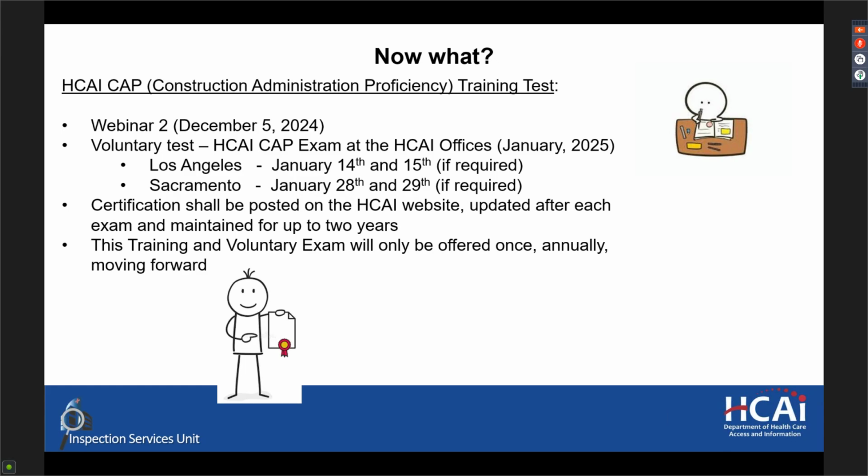If you include the NMA into a change order, you need to consider that you need to wait for the change order to be approved in order to have everything in the package of the change order, because the contractor can only build per approved construction documents. So think strategically if that NMA really makes sense to include into an ACD, or you're risking blocking some construction progress. Coordinate with the contractor, and talk always to the field staff for this strategy.